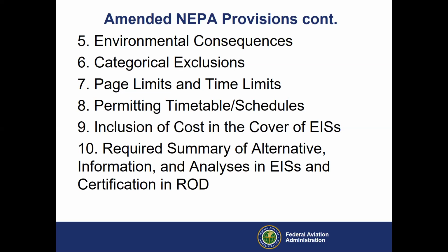We're getting there. Number 8, although the development of permitting timetables and utilization of the permitting dashboard are not new to the agency, the new regulations broaden the requirements in this area by adopting the following mandate. The lead agency shall develop a schedule setting milestones for all environmental reviews and authorizations required for implementation of the action, in consultation with any applicant and all joint lead, cooperating, and participating agencies as practicable.